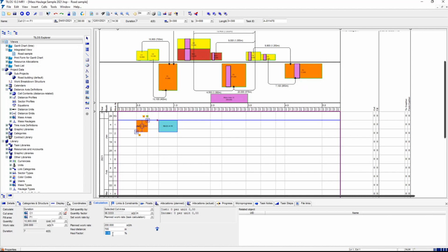We can factorize all these things, and so it's set the duration from the quantity of work. So if the quantity of work were to change, it would change the duration of the activity. And there's also a period involved, because we know how far it is that you're going to haul it. It's going to locate it at this point here. So it gives us a pair of activities.